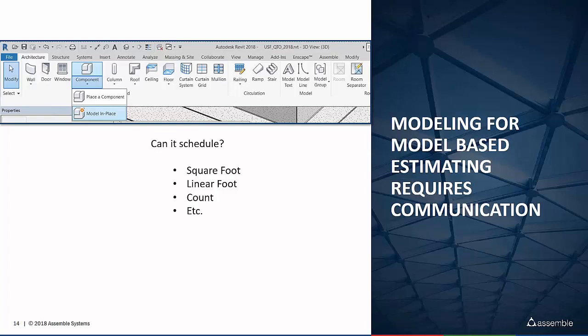Yeah, well, I think it comes down to, going back to the BIM execution plan and then talking to the owners and making sure, how are they going to utilize that information? It could be in a facilities maintenance model at the end, but the information that you want to track, you really want to pinpoint early on in the project before you even start your first model, whether it's COBie or some form of other system. So having that up front, knowing what the expectations are, is key to knowing what you need to deliver on.